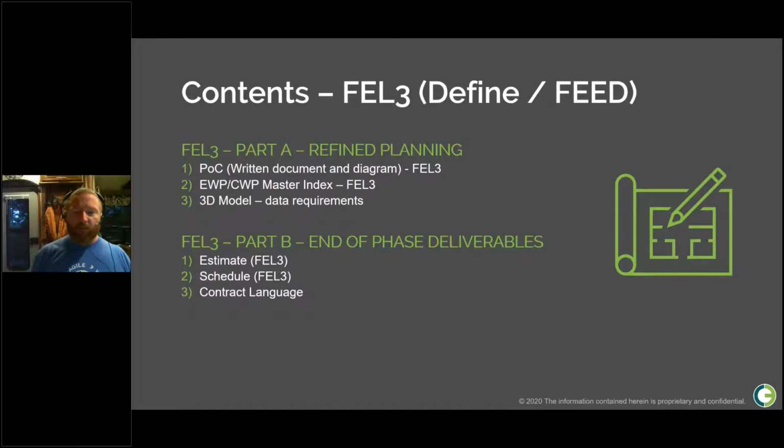The model, the three-dimensional model, is going to be an invaluable tool for AWP, and particularly for work-phase planning. Again, one of my colleagues the other day said it's no longer just a pretty picture, and it's very, very true. But a bad model with limited or incorrect data can cause a huge amount of additional churn and rework downstream. Getting it right from the beginning relies on making sure that the engineering contractor knows the expectations and can meet them.